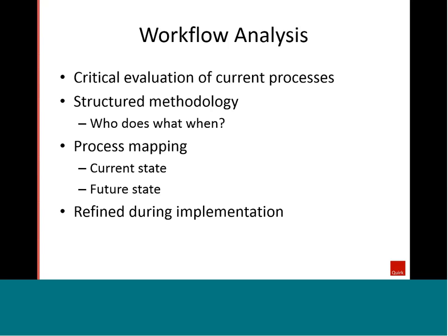The important thing to remember, though, is that you want your workflow to be representative of what actually happens on the floor, as opposed to what a particular manager may think or hope the process looks like. And so the best way to approach that is to bring all the key stakeholders together, and these would typically be your frontline staff who would execute the processes on a daily basis, and have them give you input into what the workflow really looks like.